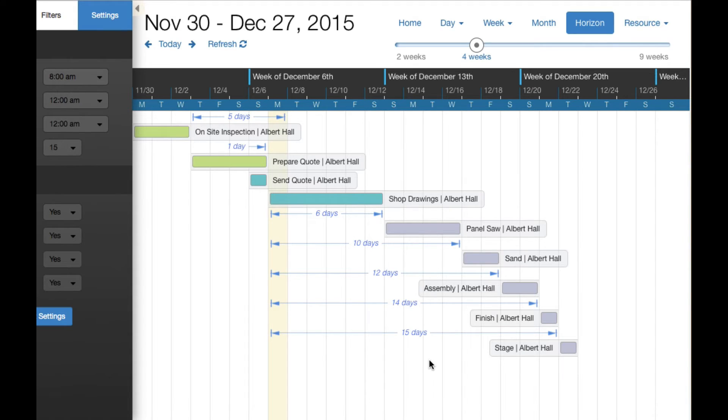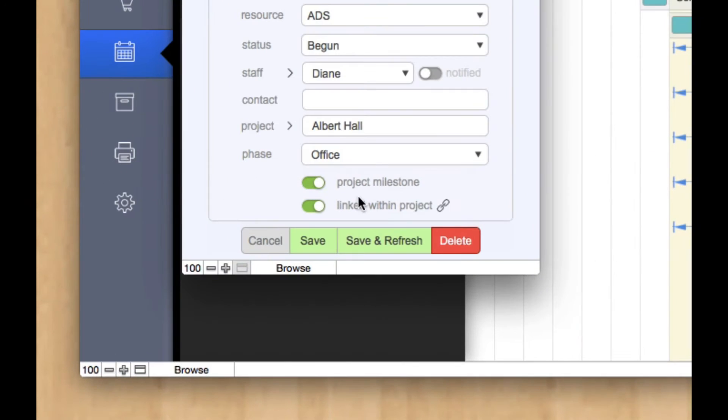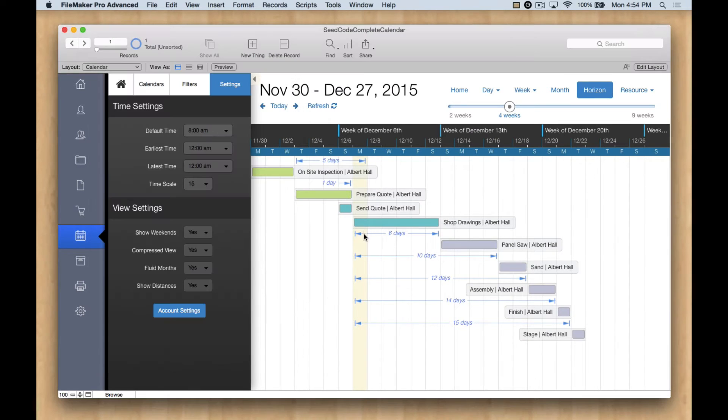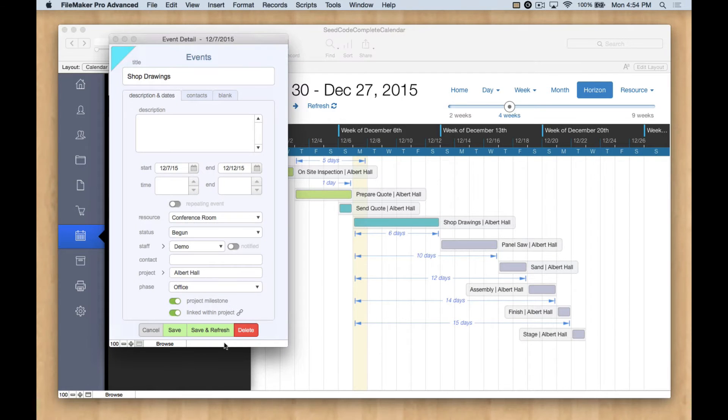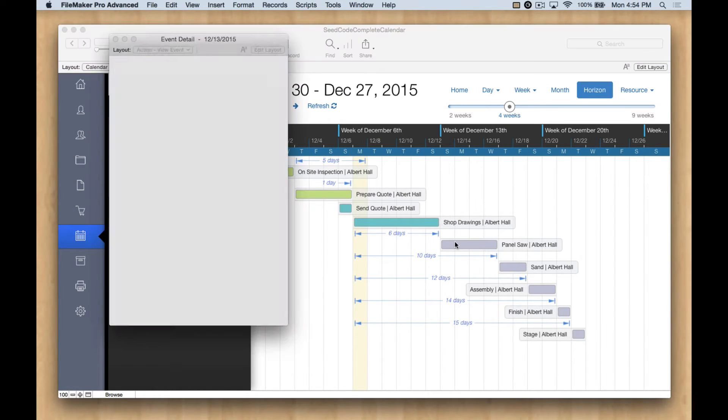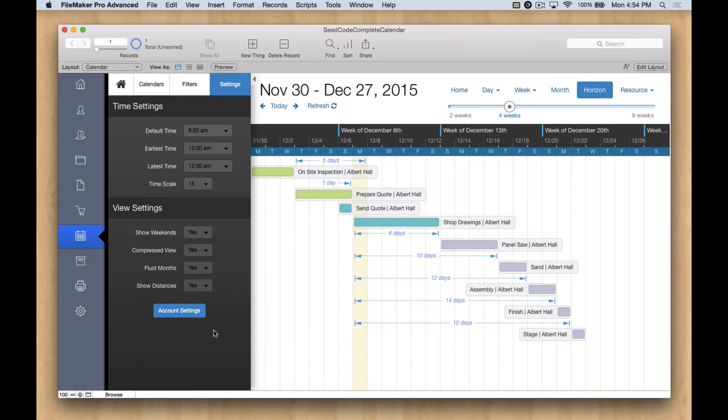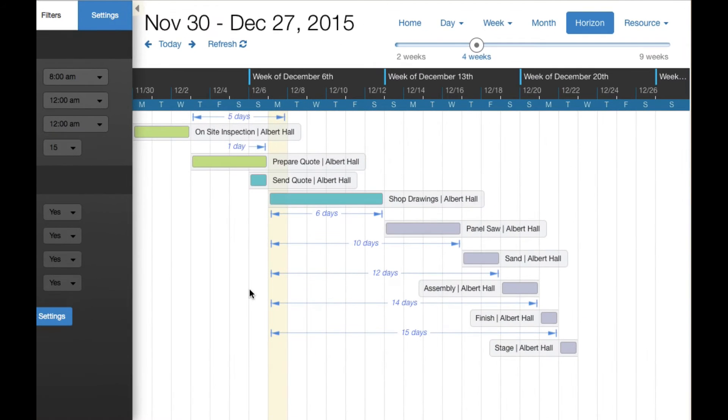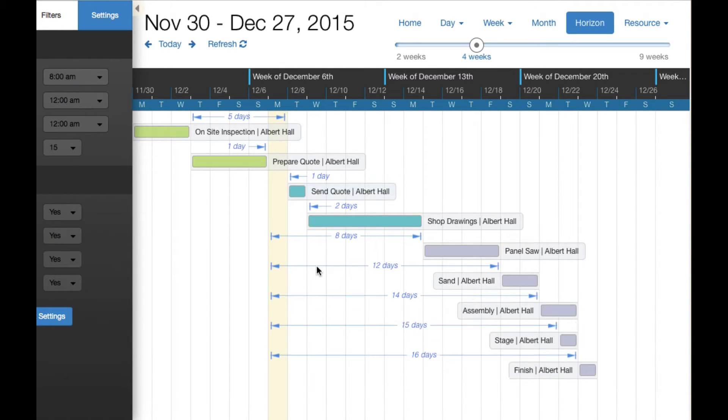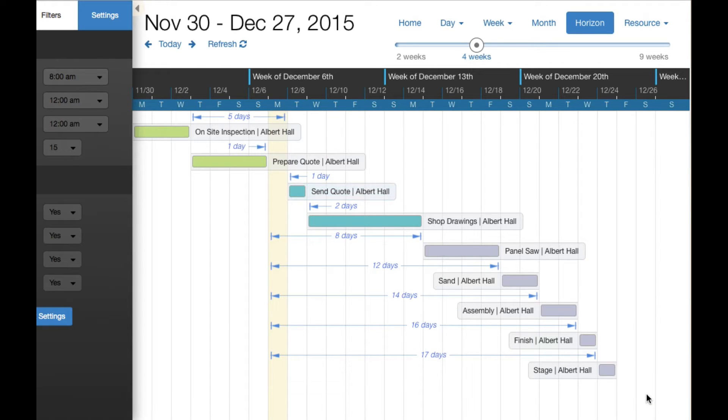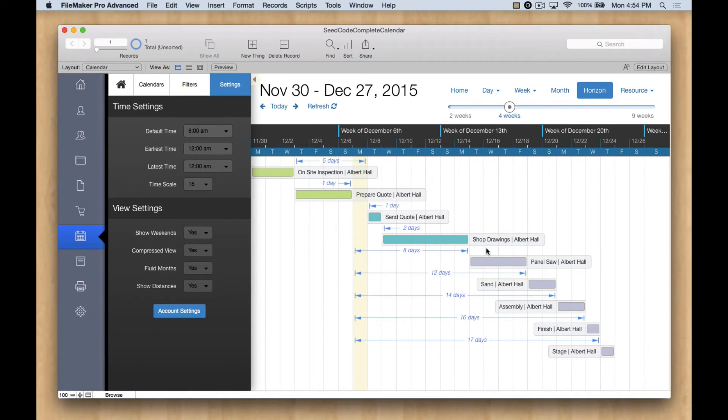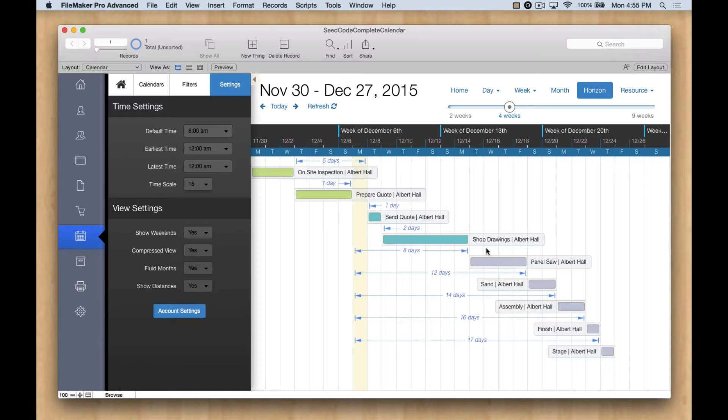Now we know in Seed Code Complete, we have the ability to link events within a project. And basically, what that means is we've chained these events together. So if we change one, the downstream events are going to change as well. So in this case, the quote may not have gotten done yesterday, and it's actually not going to get done till tomorrow. So I'm going to drag it out till tomorrow. And we see that we update our downstream events visually. So we update the data in FileMaker to push all those out. And then we get a nice visual representation of that here in the horizon view. And what's really cool about that is the script that defines this is actually written in FileMaker. So if you wanted to define your own linking rules, it would not be that difficult to do. It would just be a matter of doing a FileMaker script. And then you just keep track of the event IDs that you've modified and feed them into the web viewer with a specific script at the end. And that's what does this little update here.